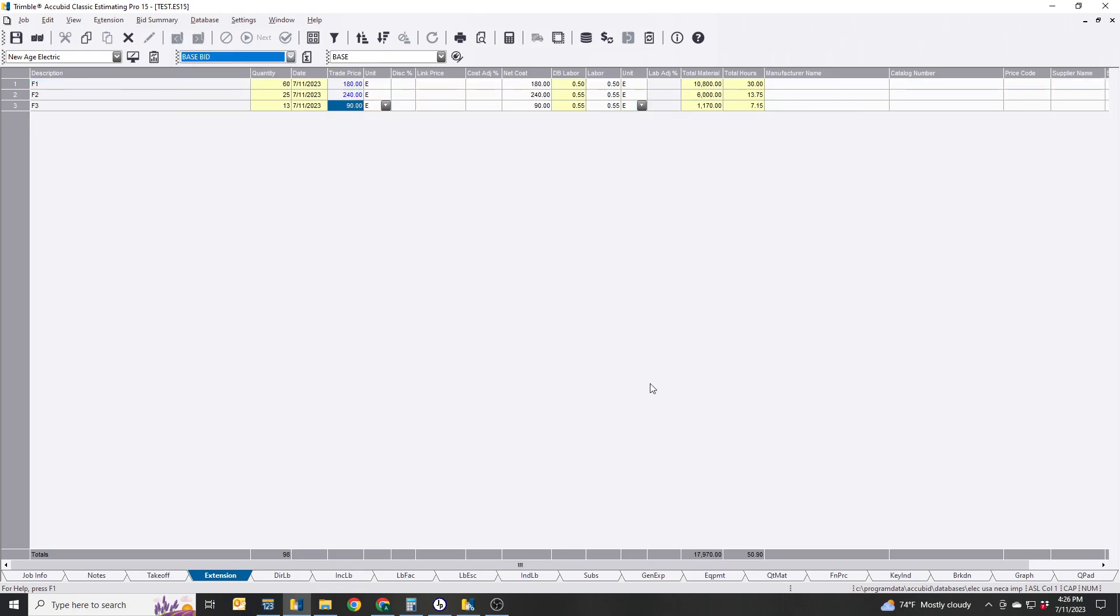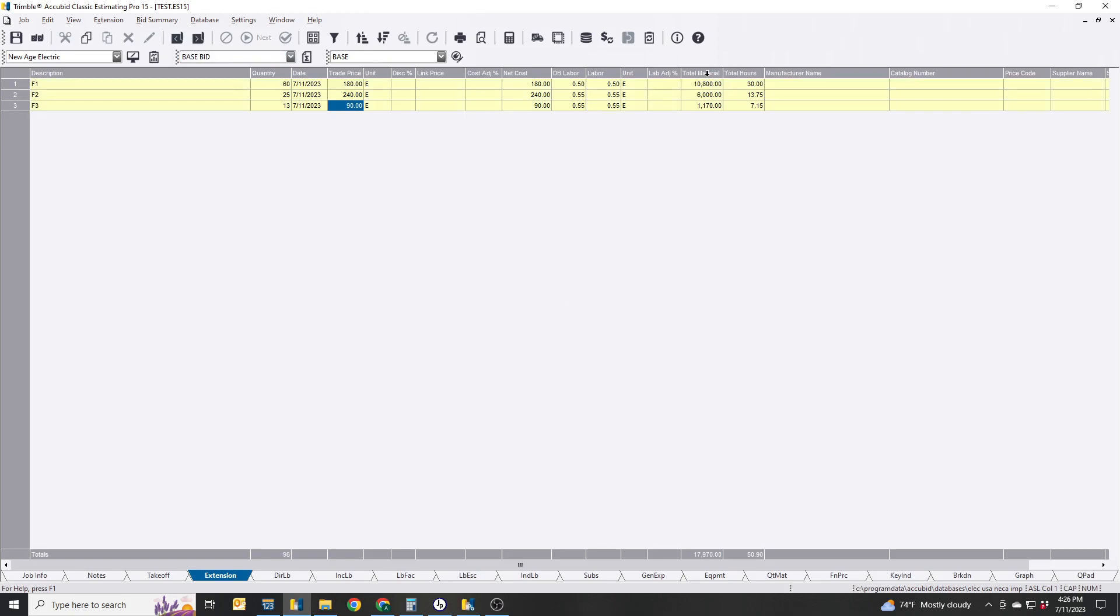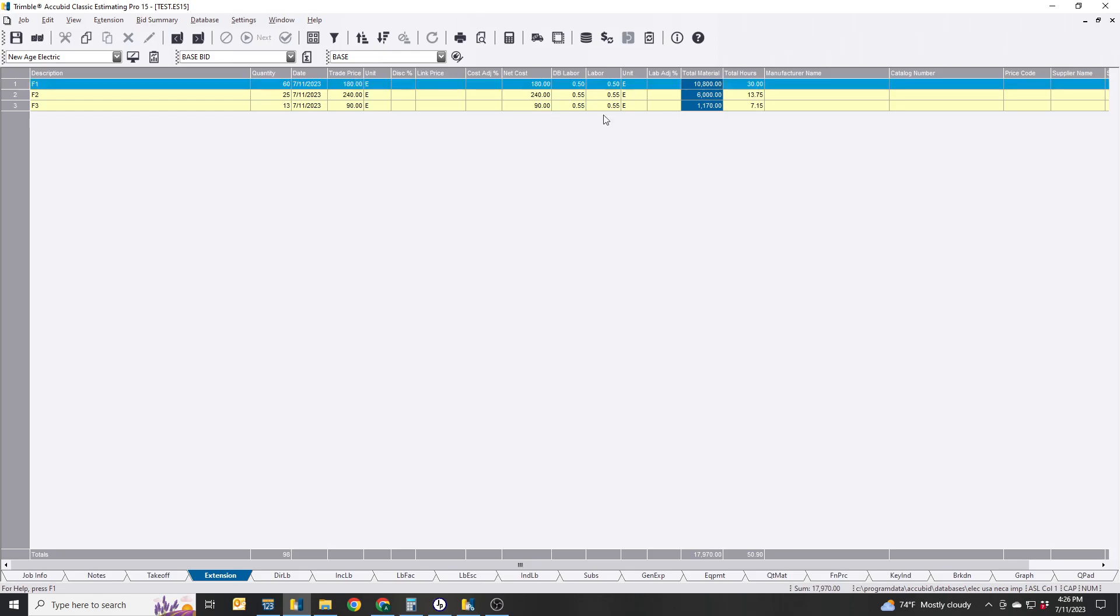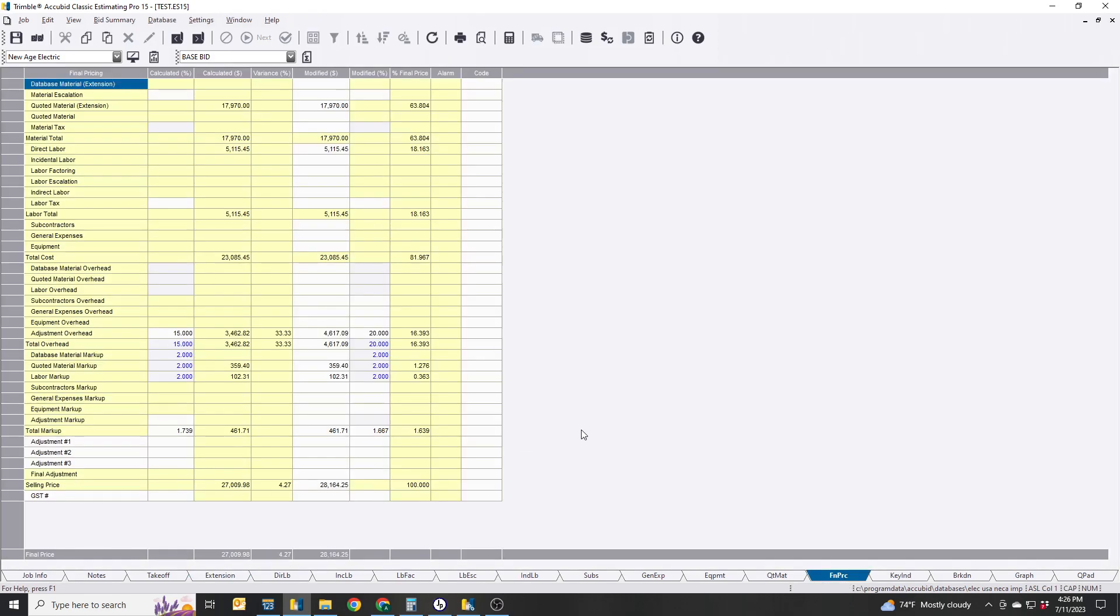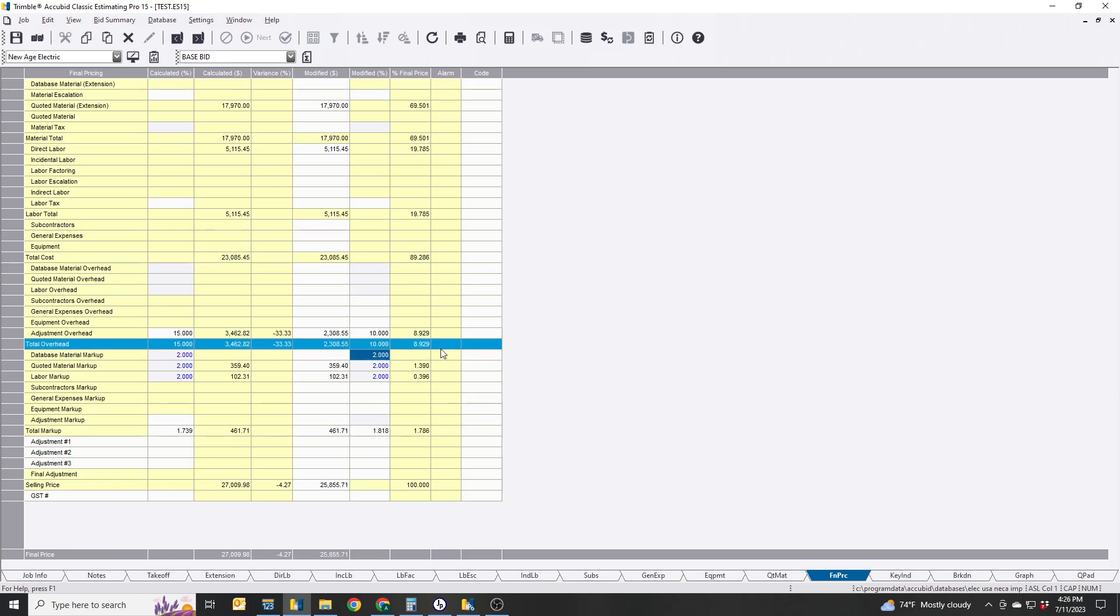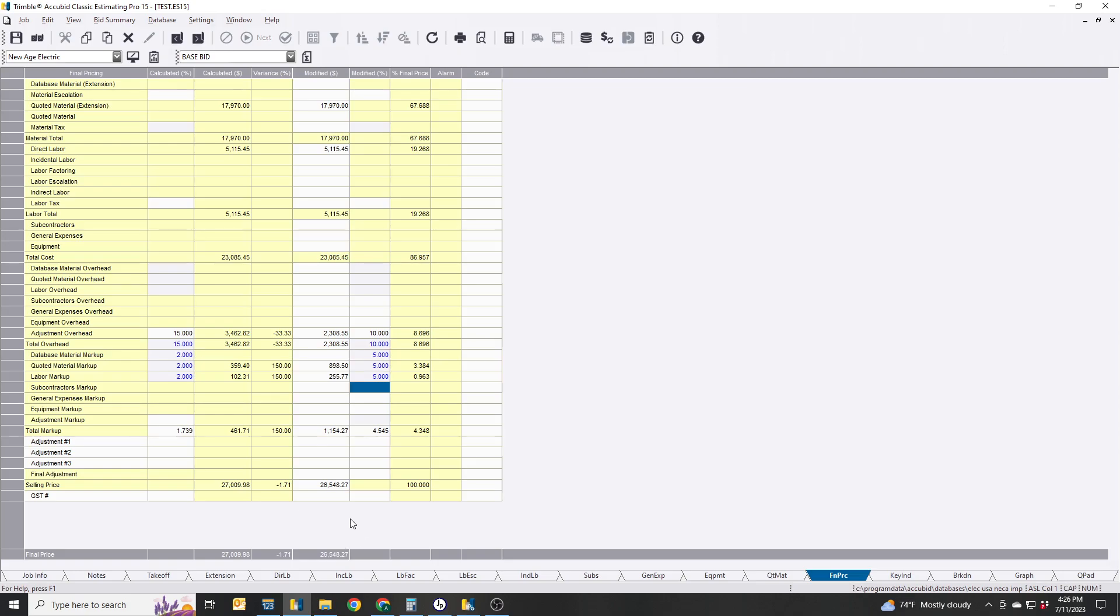I'm going to keep this back to my base bid. So here's the total cost of the fixtures, there's some labor assigned to it, and we'll go to our final price and we'll say we want to have this overall 10% and then 5% markup and 5% labor markup. So it's $26,548 for the whole job.